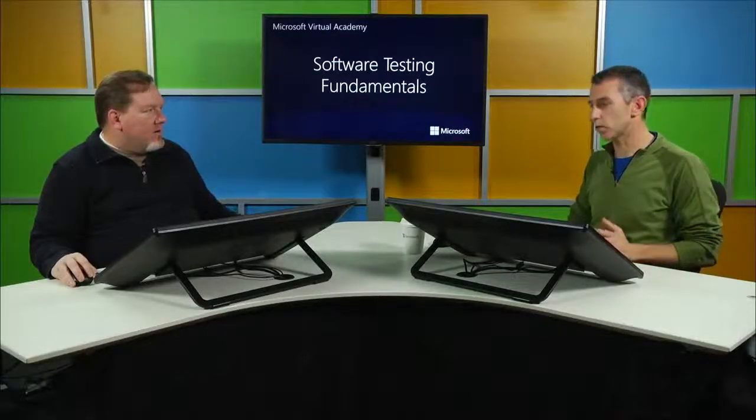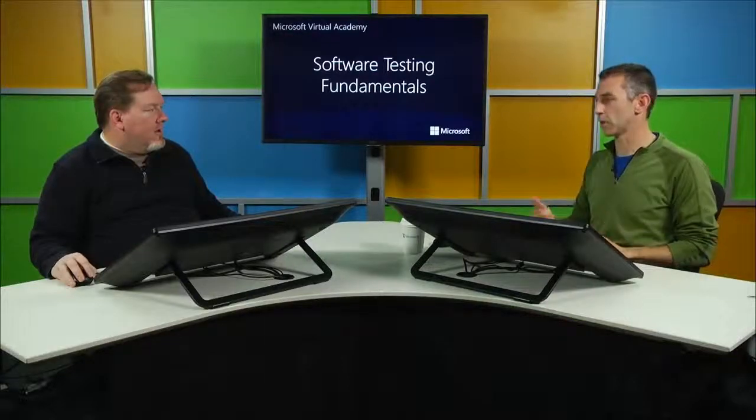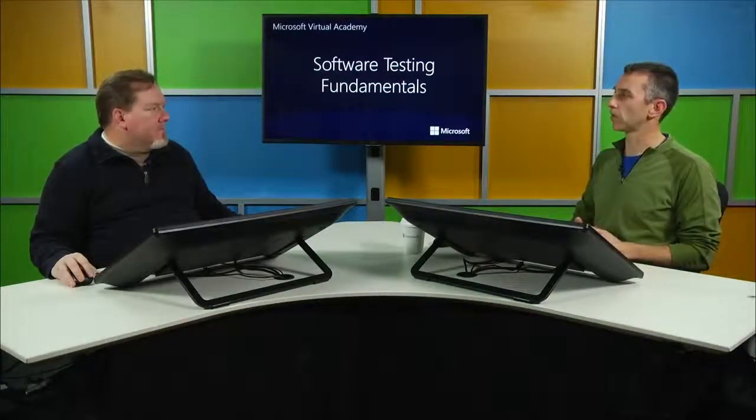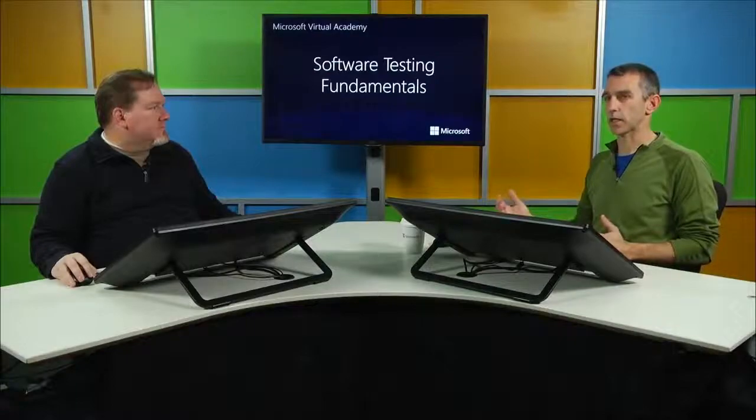So this isn't something where you could iterate 2 weeks and really make the progress you need to make. Don't you have to create big test plans as part of the waterfall? That's right. The waterfall methodology is going to have one test plan that covers the project end to end. In an iterative project, like an Agile project, you're going to have a test plan every time you do an iteration.